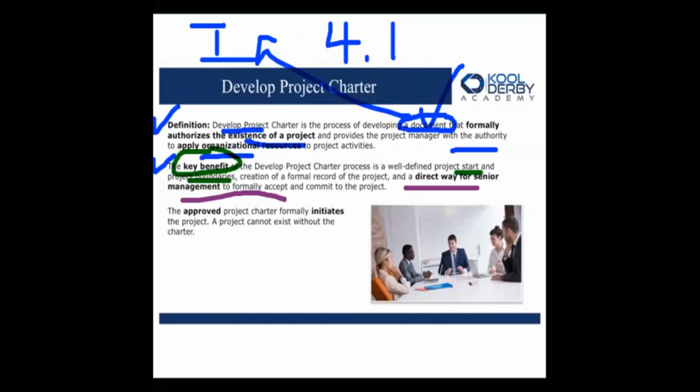All right, finally, the project charter formally initiates the project. It means that without a charter, there is no project. That's important to know because sometimes, as we know from experience, we can launch a project and never have a charter. PMI doesn't believe in that. All right, good job there.